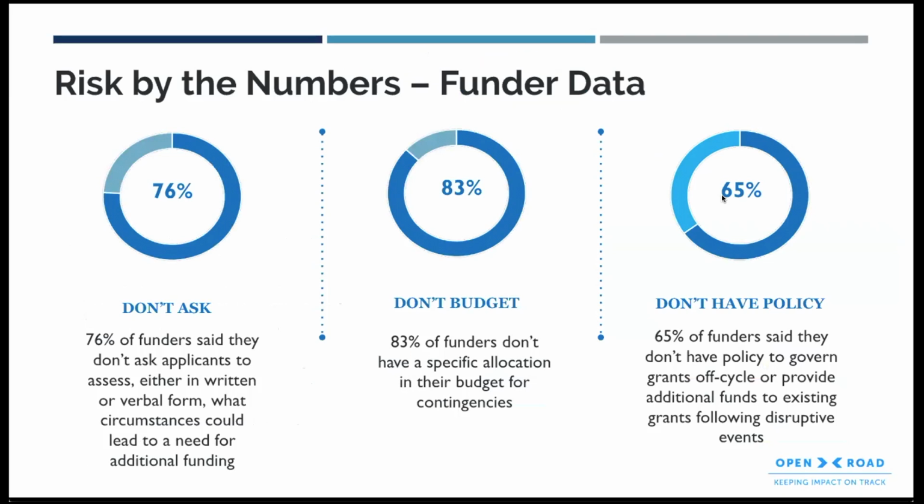Now, I mentioned before that our sector isn't quite prepared, and you might wonder, well, this all sounds well and good, but why do we really need yet another software solution for something? Well, we've done the research, and it is because nothing currently exists. So 76% of foundations don't ask at any point in their application process what could go wrong. 83% don't have any kind of budget for contingencies.